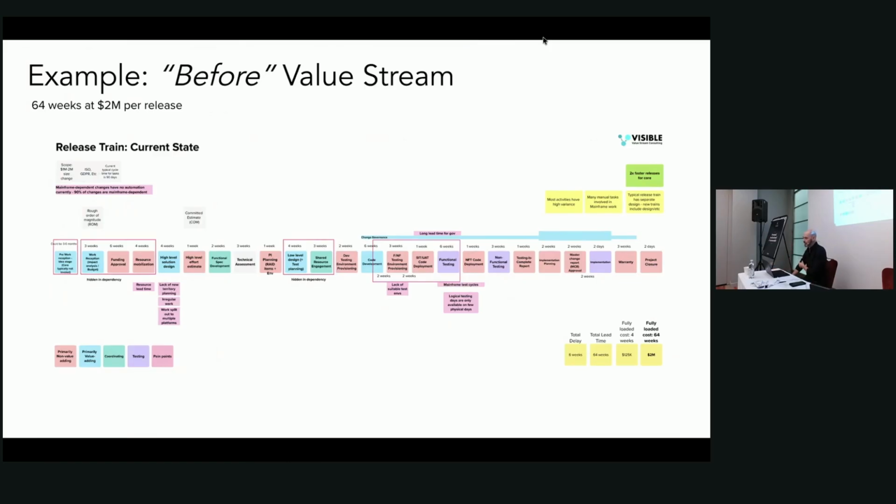This is really because we wanted a high degree of detail. You can see we broke down each activity by type, so we could see the relative proportions of types of activities that are happening. Different types could be value added versus non-value added time.